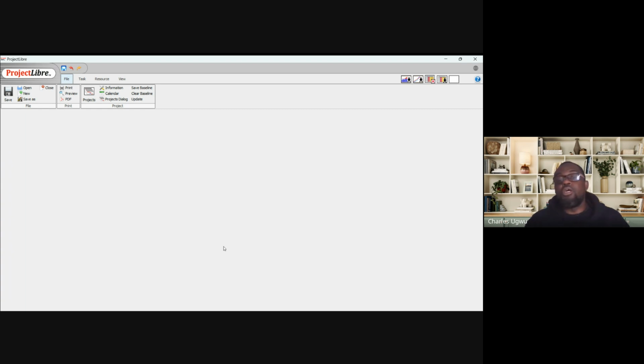So the first thing we need to do is you see here, New. And once you click New, you see Create, that's where you create a new project. It's going to open where you put the project name, the project manager, and the start date.